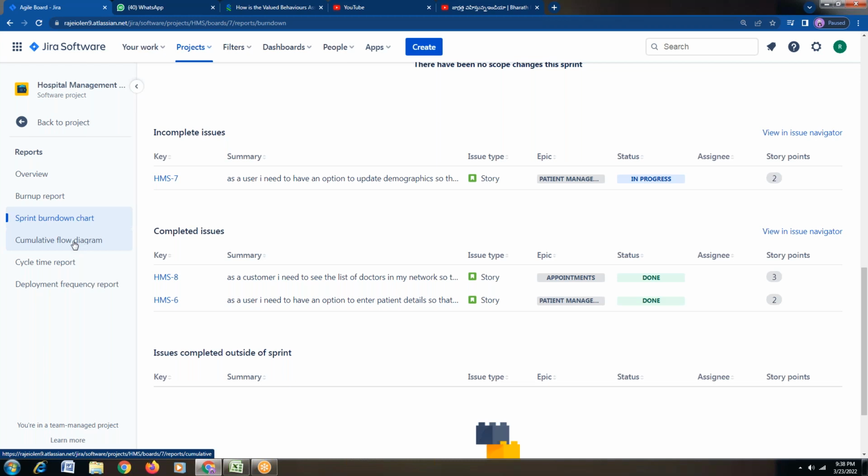So based on that, being a Scrum Master, you will know about the situation, because you need to know the reality here, right? It's not an exaggeration, not just by word. Everything should be authenticated, and formally you must know, if this continues, are we really capable enough to complete the sprint or not? You have to decide, because it will affect the release planning. So the sprint burn down chart as well as velocity reports will be prepared by the Scrum Master once the sprint planning is done, and while the sprint is completing. But for velocity you must complete the sprint. Without completion of the sprint you cannot see the velocity.